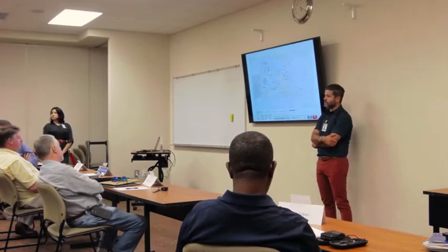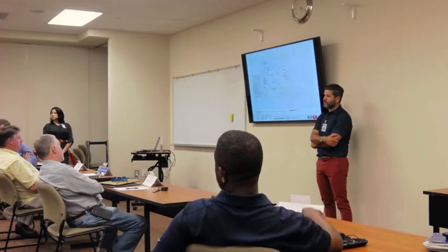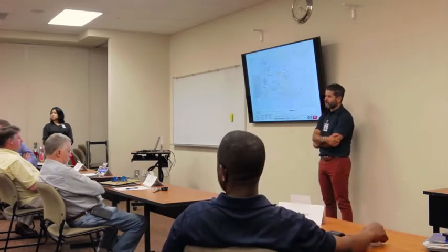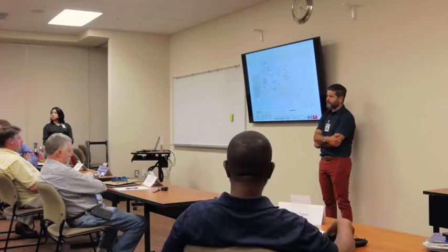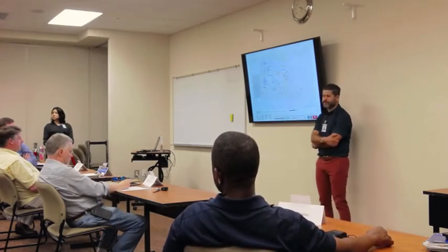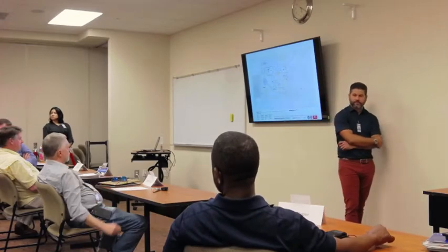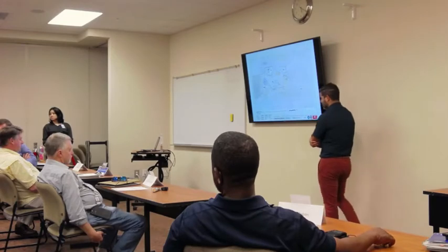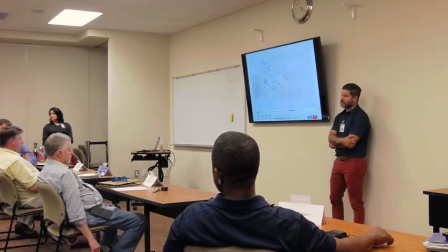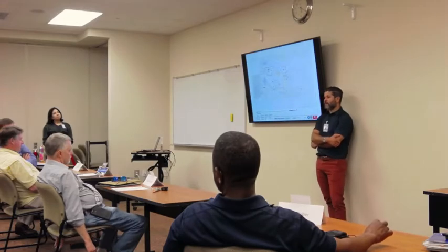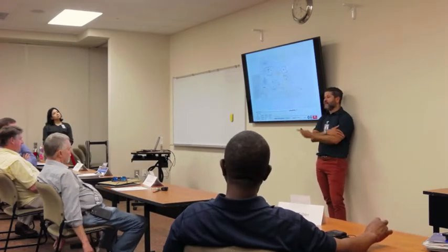We had James Stevens right across the street, which will provide food service. And it's one of the closest things to the existing Franklin Lake School that we had. So we saved on not having to go lease some property or find some property. And even if we lease it now, the county makes us go through this LDO process for cut-in link. So I think it worked out. It's in the community, it's close by, we have food service. And even though it's gonna cost a lot to set portables up, it's still cheaper than renting land.